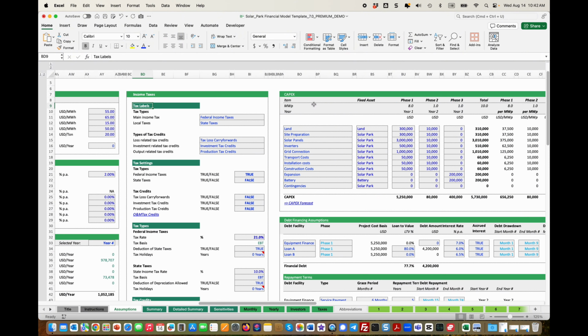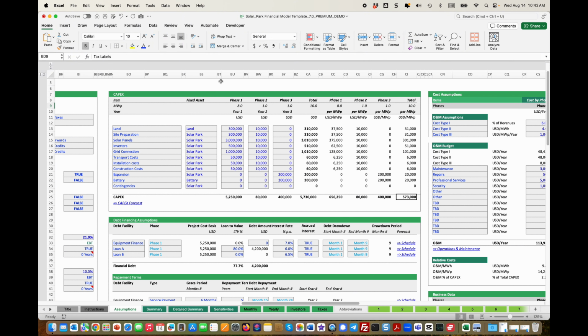The next topic we want to work through is the CAPEX topic. So what are the investment costs of the park? If we are going to build this in one phase or multiple phases, we can split up the costs, and we also want to know what's basically the cost per megawatt of installed capacity, so we can compare, are we in line with the other phase. In this case, you see these are just example numbers, is a bit low, but you get the idea.